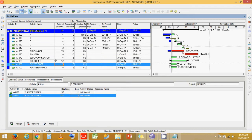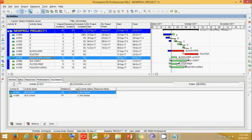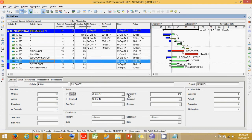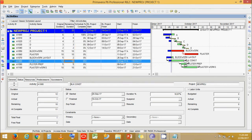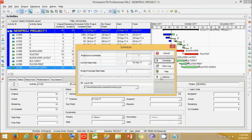Give all of them a lag of two days and assign durations. Now say Block Work Layout is already started. Instead of waiting for it to complete, Block Work Construction has also already started and is in progress. Say we have two days remaining for Block Work Layout and 10 days remaining for Block Work Construction. If we schedule this, the activities follow the correct sequence and the project finishes on 21st October.